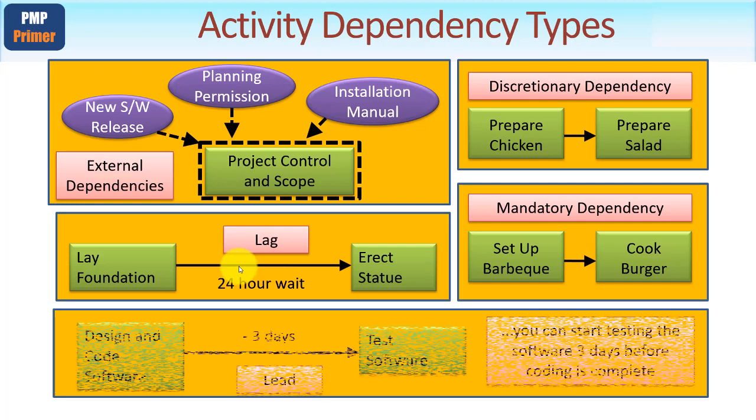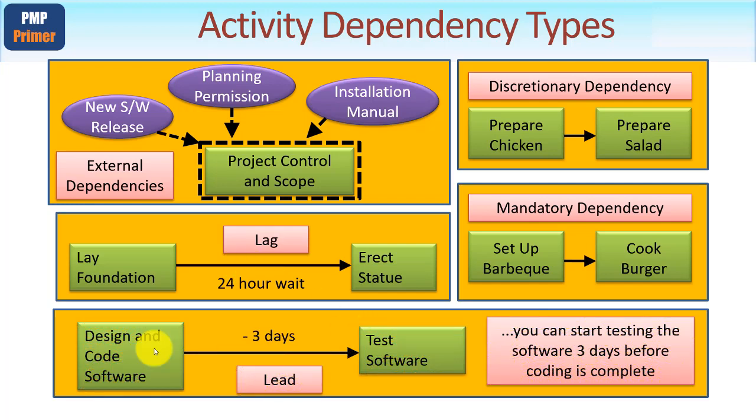The reverse of that is called a lead. And here, let's imagine we're designing and coding some software. Well, we could actually start testing some of it even before we've completed designing and coding all of it.